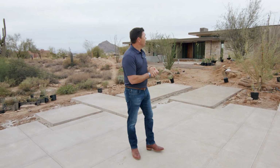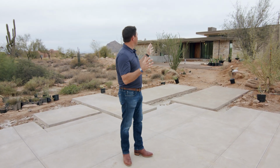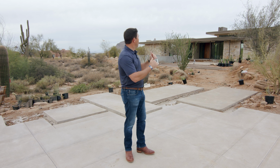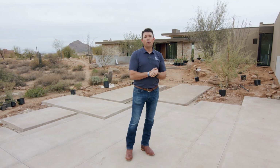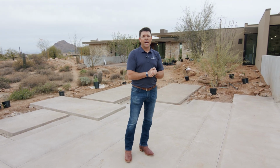And then it also just creates some challenges on getting all of your window and door heights just right, because they go floor to ceiling. So there's a minimal tolerance on doors, windows, along with all of your rough-ins when you're building houses like this.